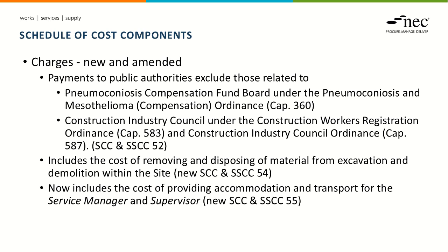Certain charges are specifically excluded under section 5 of schedule of cost components, and a new clause has been introduced relating to section 7 of the contract about removing and disposing of material from excavation or demolition within the site. Cost of accommodation is also included under the charges. And so that's the equivalent to ECC Hong Kong edition.